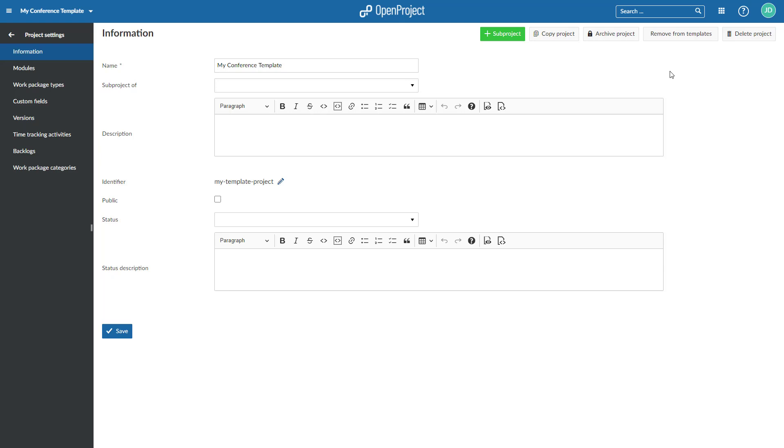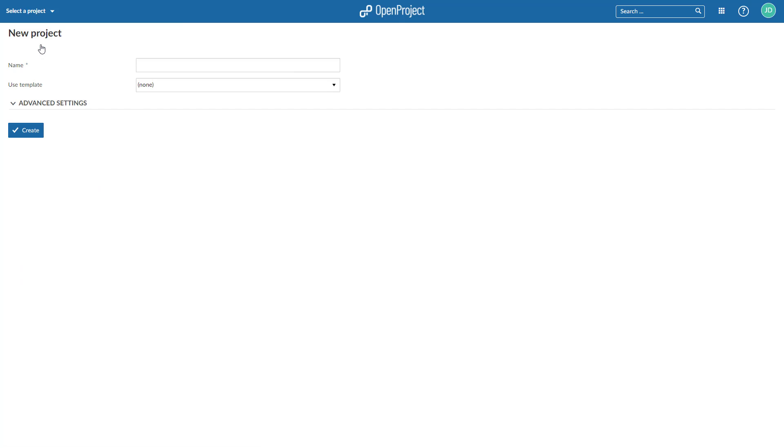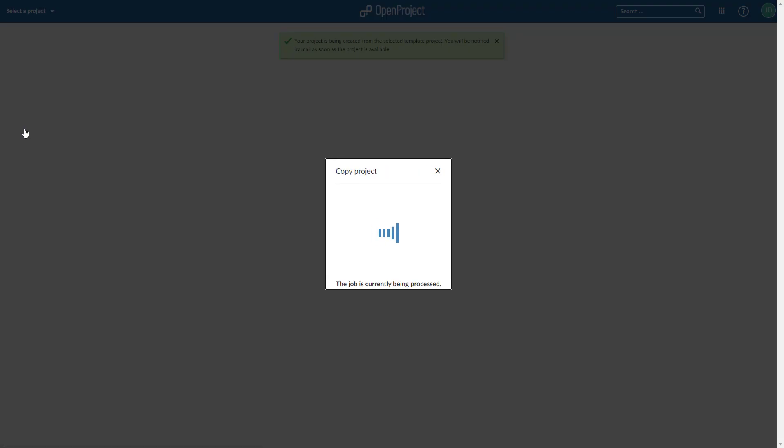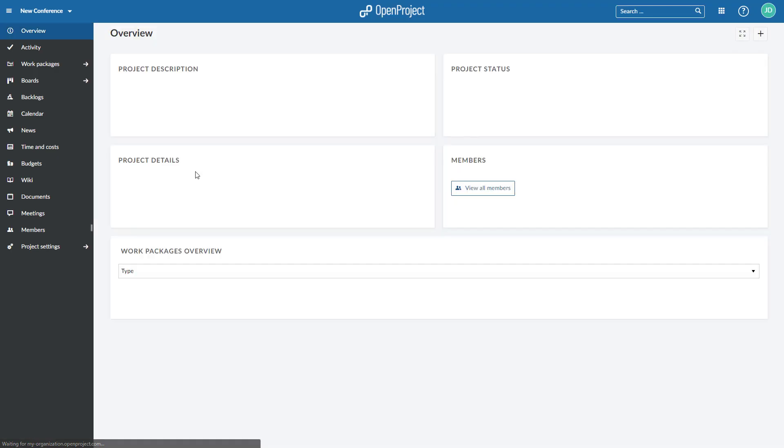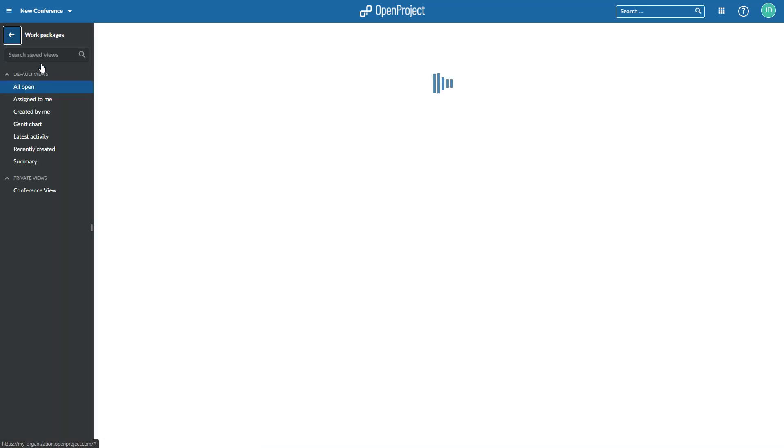Now, you can create a new project by using an existing template. This causes the properties of the project template to be copied to the new project. Click on Add Project, type in a name for your new project, and then select the template which should be used as a basis for setting up the new project. The new project will then be created based on all the configuration you did within your template project.